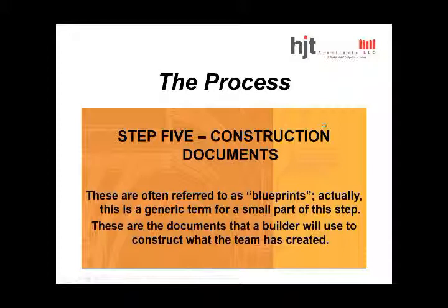Actually, it's a generic term for a very small part of this step. These are the documents that we create that actually help the builder to give you a specific price, get you a permit, and eventually that they build from to create your final solution or your final project, whether it's a renovation or a new build. Looks something like this, very complicated, but really it's how we communicate directly with the builder, and he now knows from what he sees there what to build, how to build it, and what sizes and relationships they should be.